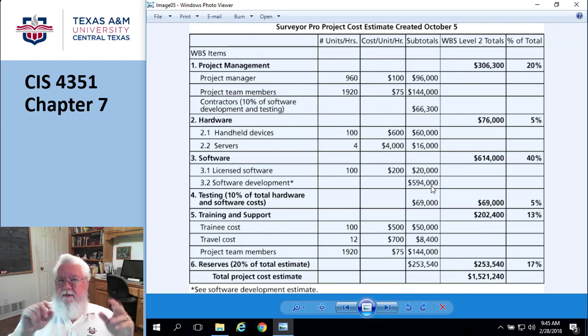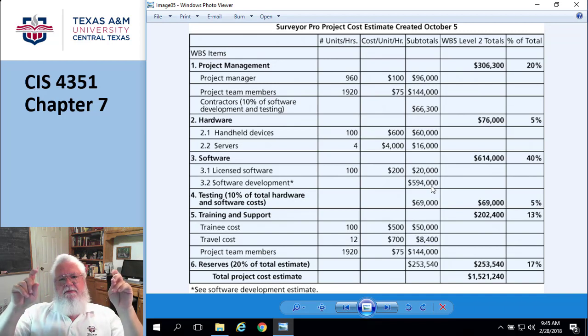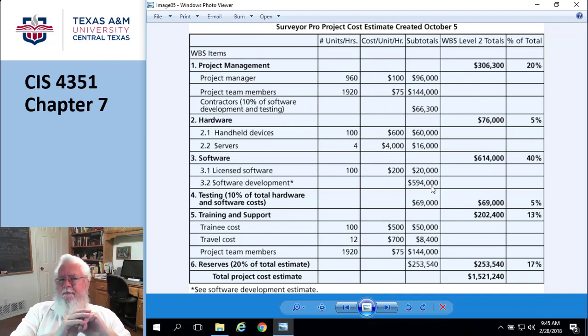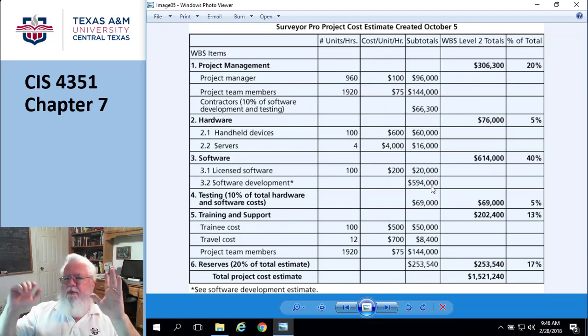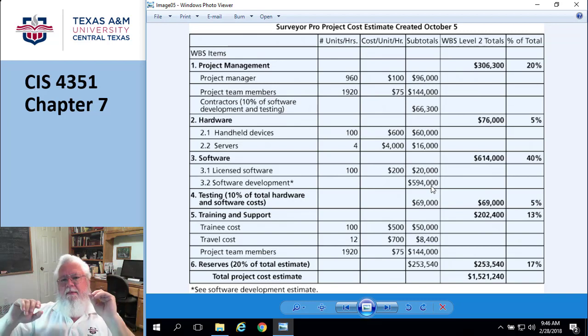There's one called KLOCs, which is 1,000 lines of code, KLOC. The other one is this thing called function points. The function points would be difficult to describe, but just bear with me. Function point is a level of complexity. You could go through the specifications for a piece of software and count up these function points. I'm not even going to bother to describe what they are, but you can count them up. And then using this parametric approach, remember that? We can throw this into a formula. It's going to tell me how many hours and what the costs are. Okay, cool. So I am going to skip the boring details of this and go directly to the next figure.